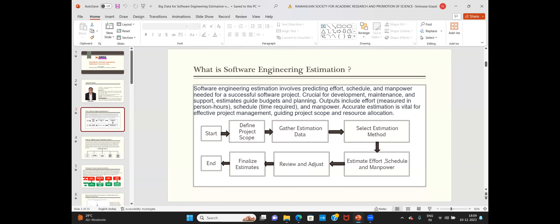Mostly these estimates will not be accurate due to several reasons. Estimation accuracy is a big challenge with the models involved. So during the software development life cycle, you'll have to review and correct those estimates using an iterative procedure, adjusting the estimates so that they converge to the actuals. One important challenge that currently exists is the accuracy of the outputs being provided by these models.